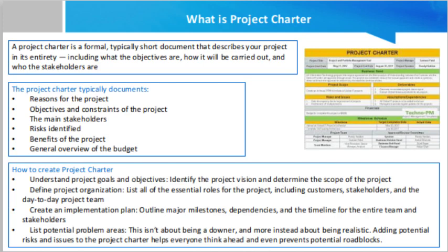Now, how to create a project charter? Understand project goals and objectives, identify the project vision and determine the scope of the project. Define project organization: list all the essential roles for the project, including customer, stakeholder, and the day-to-day project team.